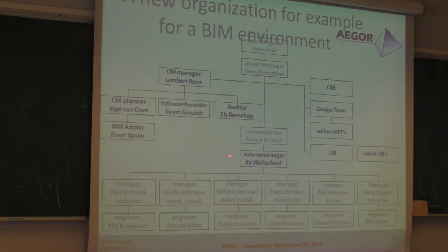I put a volume manager here. We call it a volume manager in Holland. Internationally, they call this guy an area manager, but the word area was in Holland occupied by so many other things. So I took volume manager, and the volume manager is a guy that is responsible for placing and fitting of any component in a given space or space envelope. That's my volume manager. So this doesn't come from CMT, this comes from my IPM way of working.